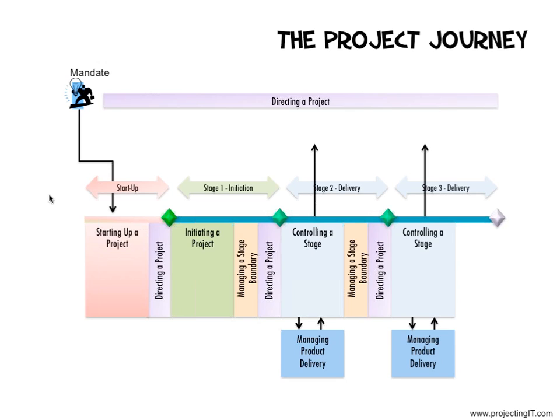If there is any tolerance exceeding, the team raises an issue to the project manager, and if any tolerance is forecast to exceed in stage 3, the project manager notifies the project board. The project board on their part has to make sure that the project remains within tolerance. But if project level tolerance is forecast to exceed, then the board will have to inform the corporate or program management.